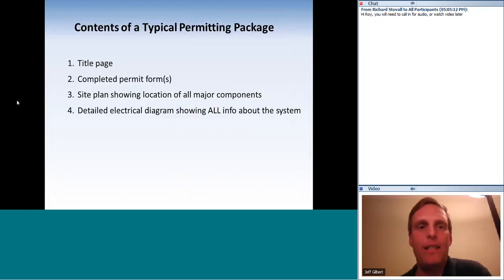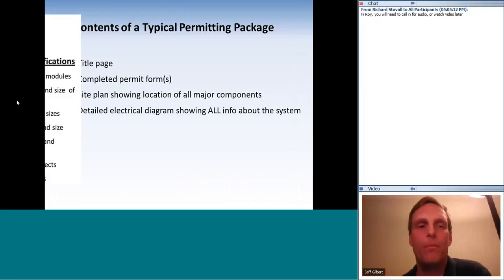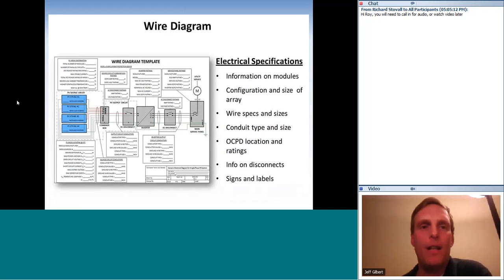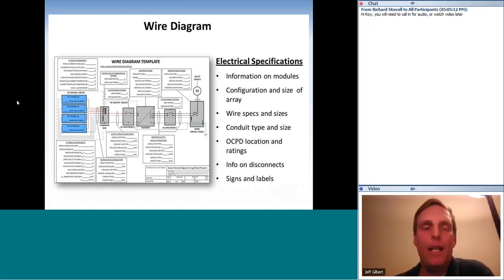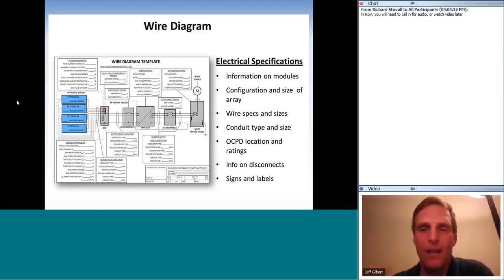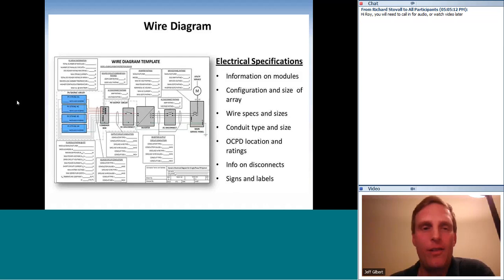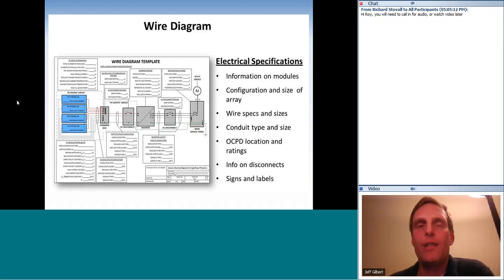Next is a detailed electrical diagram showing all information about the system — possibly the most important part of the package. The wiring diagram needs to show information about the modules, array, wire specifications and sizes, conduit type and sizes, overcurrent protection device locations and ratings, information on disconnects, signs and labels — all the information so that an electrician can look at the plans and know exactly what to do.